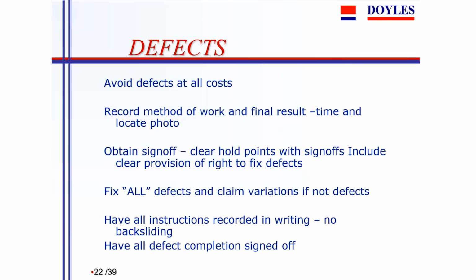The scenario is, as well, one should record as a contractor the method of work and the final result, and time and locate the photos. Say, for instance, if you're a subcontractor who's required to waterproof 20 bathrooms in a high rise, each bathroom should be carefully checked, with photographs taken of the method of work that was implemented, and the quality of that work.